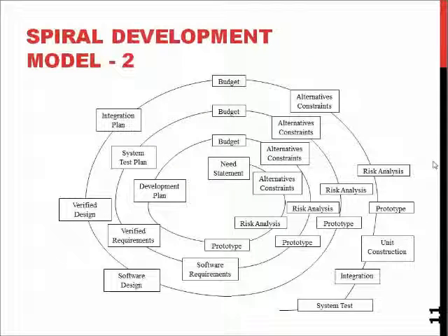So basically, the idea is something like this. We start with the needs and we start with the first constraints and requirements. We do risk analysis to understand what could go wrong and what are the things that we have to address in our development. Create a first prototype to assess how feasible everything is. Do a development plan and go with the budget and start going on the loop or spiral into more and more